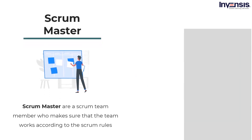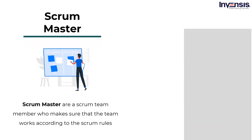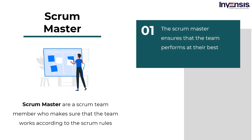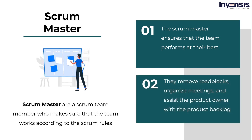The Scrum master is a Scrum team member who makes sure that the team works according to the Scrum rules. The Scrum master should ensure that the team performs at their best, which may include removing roadblocks, organizing meetings, and assisting the product owner with the product backlog. The Scrum master is a servant leader — a helpful leadership style. They decide what the team members' tasks are on a daily basis, assist the product owner by better understanding and communicating value, managing the backlog, planning work with the team, and breaking down tasks to give the most effective learning.